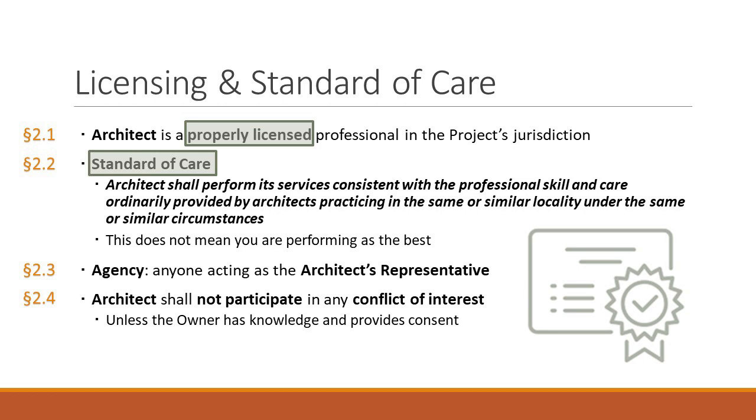This is different than in construction contracts with the owner-contractor. There you have warranties and everything is 100%. Here, an architect can never give 100%, can never have perfect drawings. So the best you are required to do is perform in accordance with the standard of care, but now you're contractually obligated to perform to the standard of care. So you can have a breach of contract as opposed to just simply a tort.